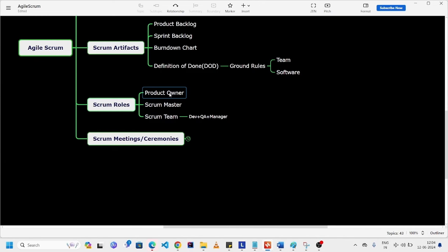What does it mean? Sometimes we get pressure from the product owner to complete more user stories. For example, the team can complete a maximum of 4 user stories in a sprint, but the product owner asks, please work on 6 requirements in the current sprint. In that situation, the Scrum Master will talk with the product owner and convey the message that it's difficult to commit to 6 stories.